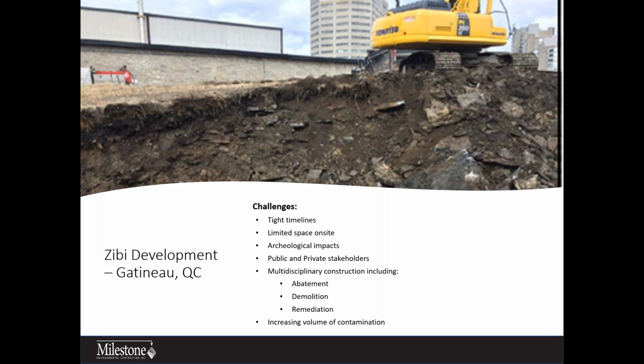Portions of this work involved remediation of impacted materials within and around historic buildings that were being integrated into the development, so underpinning and shoring was completed to remove the impacted materials and maintain the structural integrity of the building. Further challenges encountered involved an increase in contaminated soil volumes that were uncovered during remediation work that required more schedule, space, and additional screening requirements to ensure material would be assessed as a reusable material.